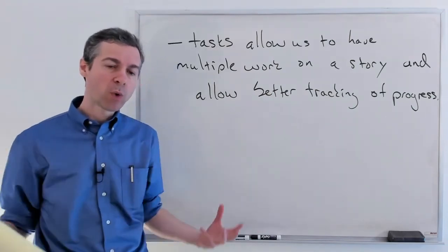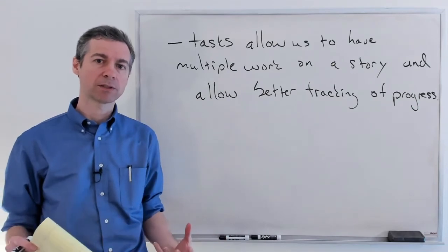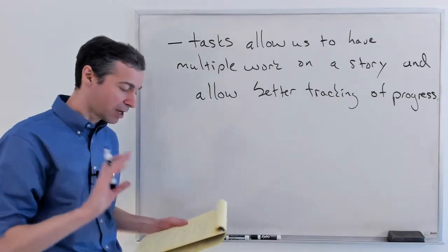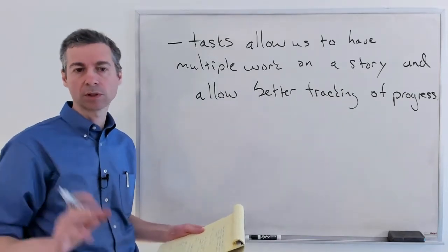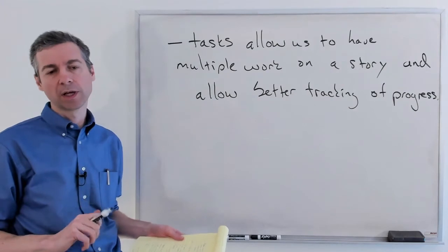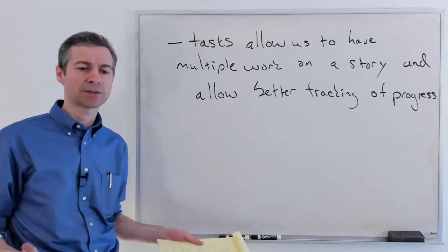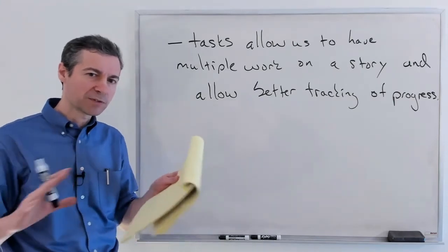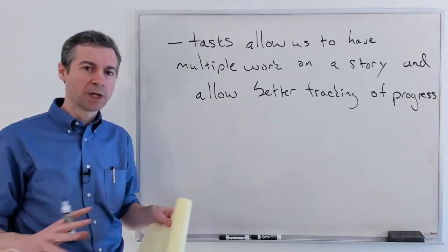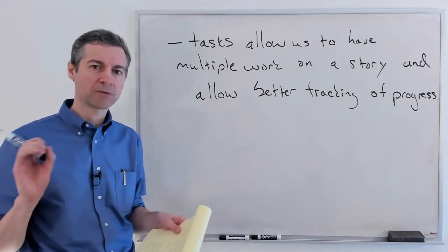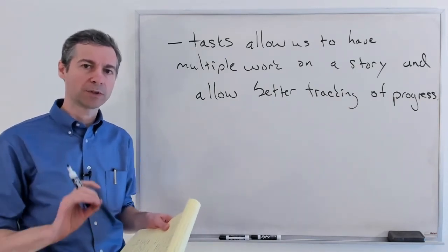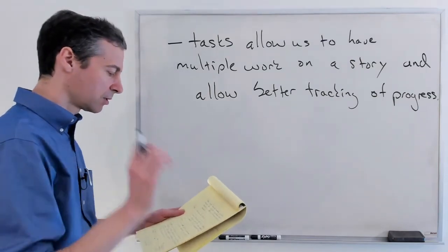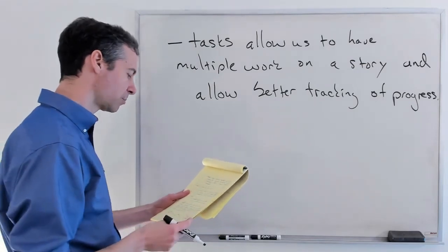We want to know where they are in the development process. And so we want to break up our task size. Now, for more industry work, you might actually say, oh yeah, your tasks shouldn't be more than a day. Again, everything is a little bit different on a different scale. For 342, certainly these really small breaking up of tasks is really useful, I think, for student management of tasks, and also to learn the process of Scrum, because we get to track things and understand things a lot more.